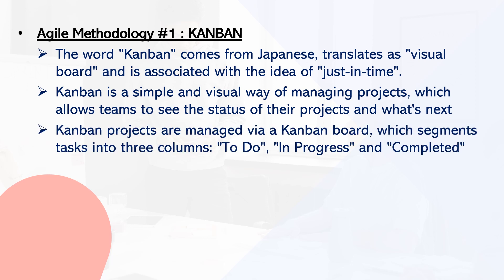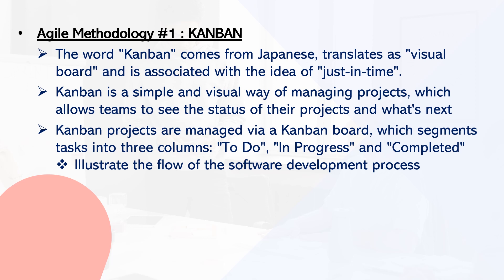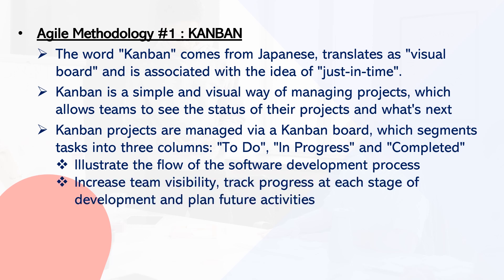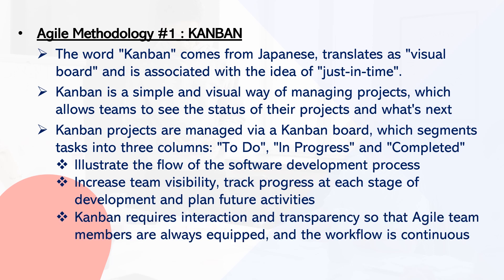Kanban projects are primarily managed through a Kanban board, which segments tasks into three columns: the to-do column, the in-progress column, and the closed or finished column. This board illustrates the process flow of software development, increases agile team visibility, and helps plan forthcoming activities to deliver the product just in time. Kanban necessitates extensive interaction and transparency to maintain a continuous flow of work.